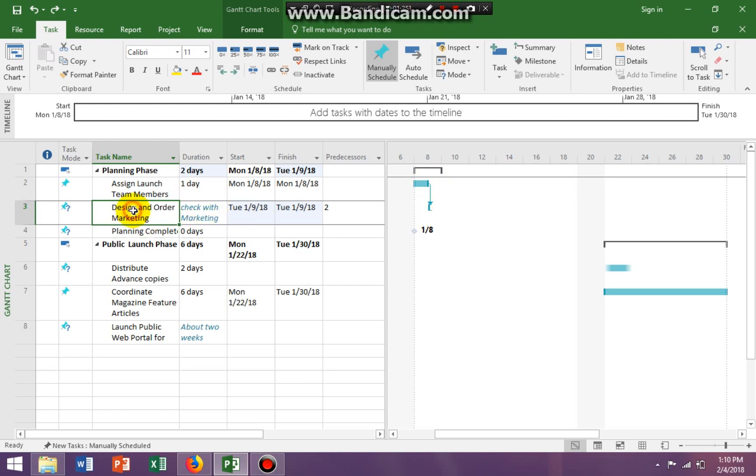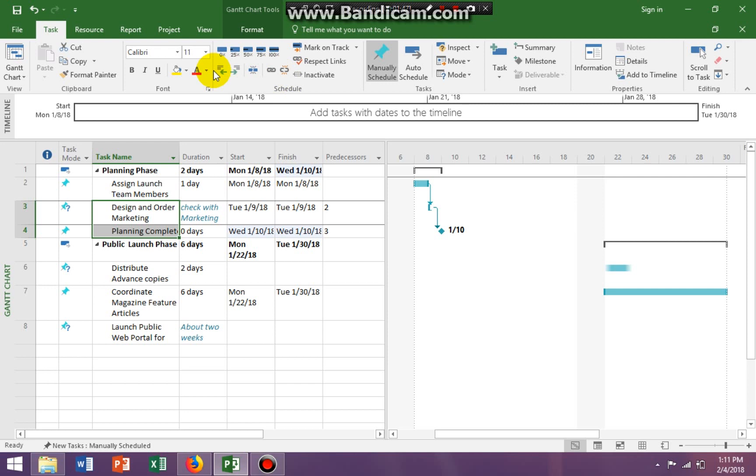Okay, all right. So if I linked it this way just by highlighting task three and four and going to the schedule group and say link, it does the exact same thing. So it's just another way to set your predecessors and to link everything together.